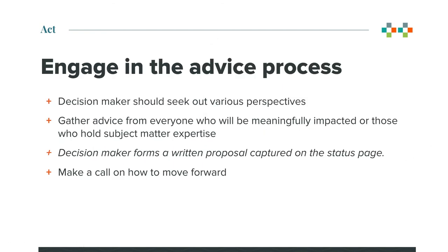Next, you'll engage in the advice process. Prior to forming a proposal, the decision maker should seek out various perspectives, and they should look to gather advice from everyone who will be meaningfully impacted or hold subject matter expertise. This collective wisdom is in support of the pursuit of a sound decision. The decision maker will form a written proposal informed by the advice that they gathered. The proposal is captured in the status page.